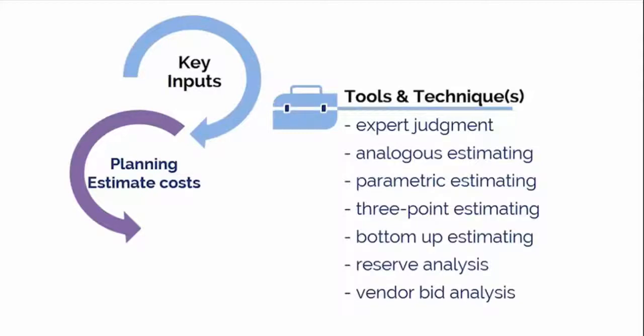Management reserves are for risks that have not been identified, also referred to as unknown unknowns. Unfortunately, most projects are hit by unidentified risks, so management reserves serve as a source of protection. The project manager may be required to obtain approval before obligating or spending management reserves. Management reserves are not a part of the project cost baseline, but they are included in the overall project budget. Regardless of the type of reserve, some organizations have standards set for the amount of funds they allow as a buffer, as well as taking into consideration the type and level of risk.